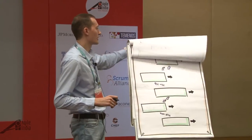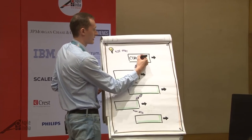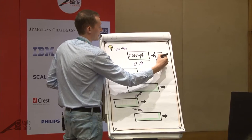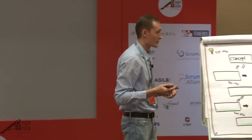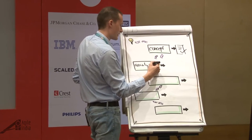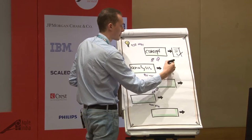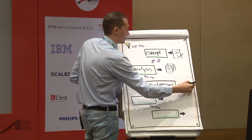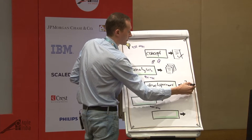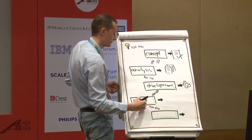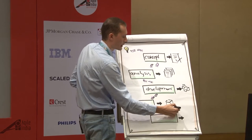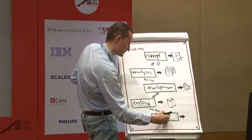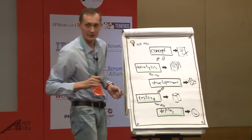If we look at the traditional way of running projects, we create a business case in the concept phase, deciding how much money to allocate and how long it's going to take. Then you move to analysis, create documentation — a traditional waterfall way — then development, then testing of unverified code to get some sort of product, then deployment to get to your happy customer. That's how we traditionally ran projects and why we needed a business case.